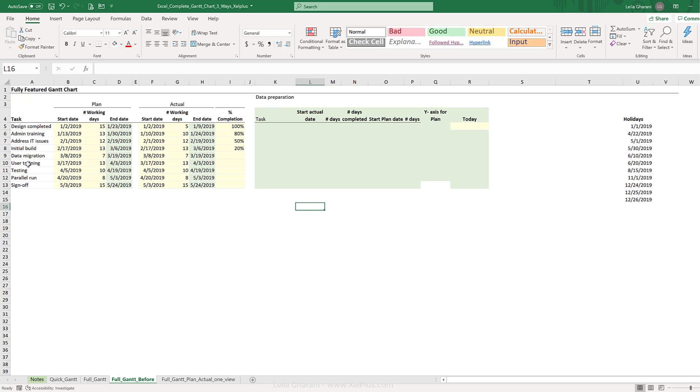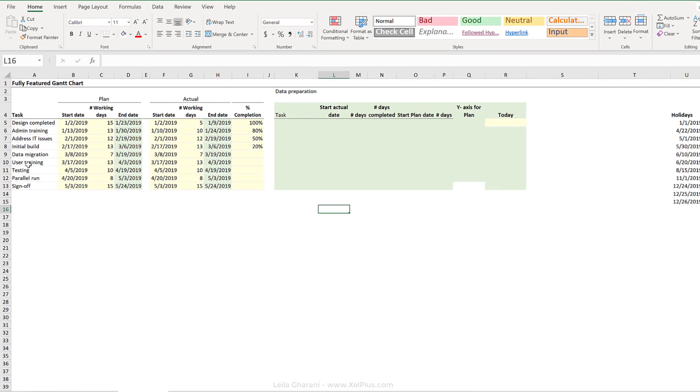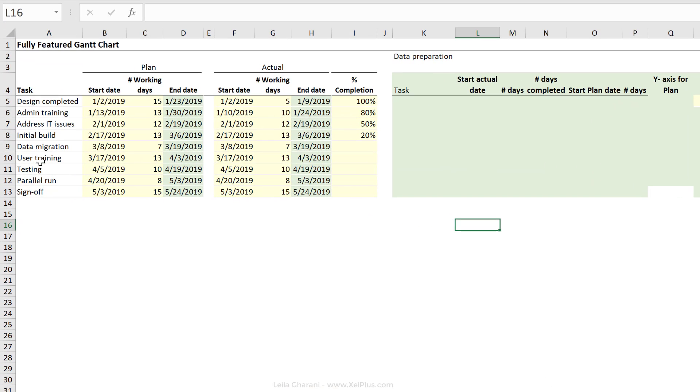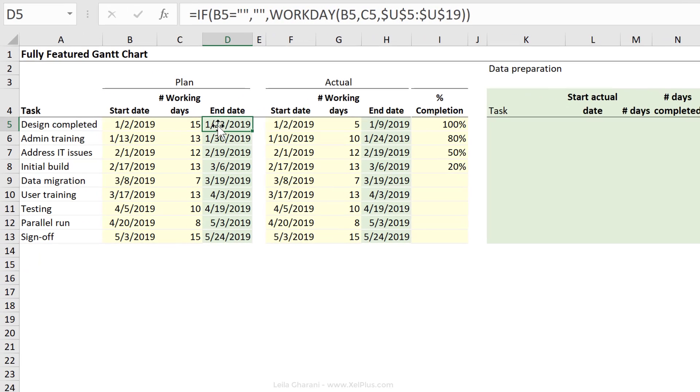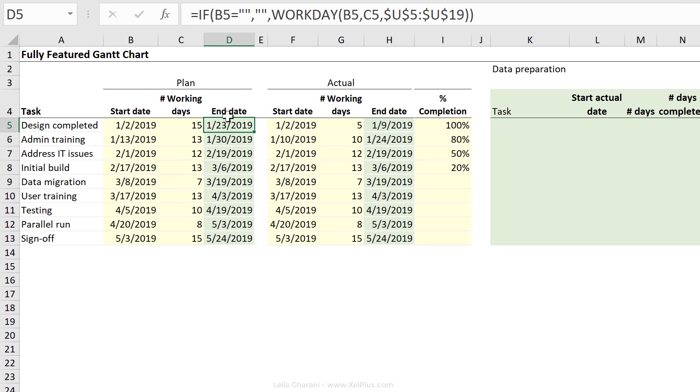Here I have the tasks I need to complete for my project. This part is the planning of my project. I've put a start date for each task and the number of working days I think the task is going to take me. The end date is automatically calculated using the workday function.